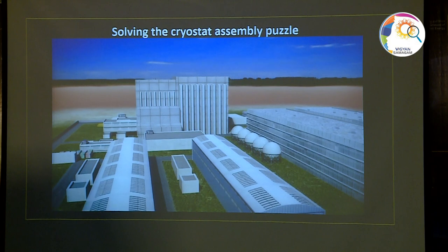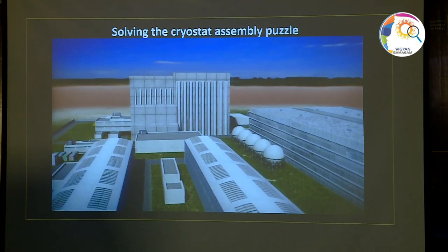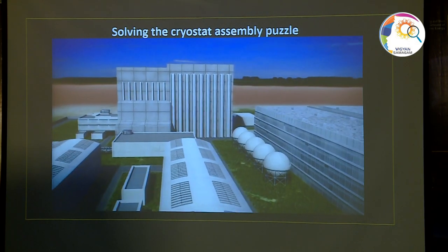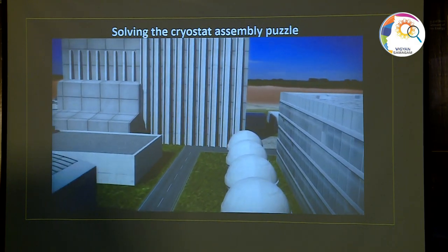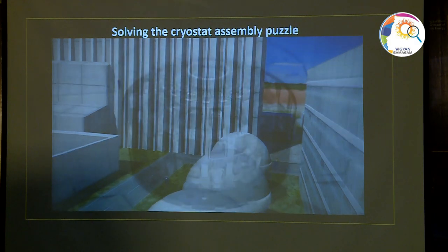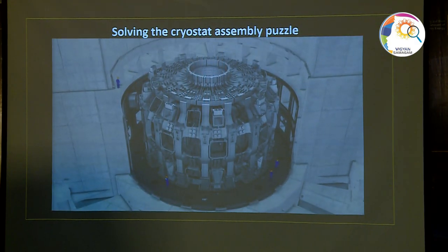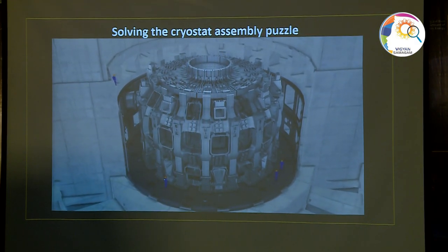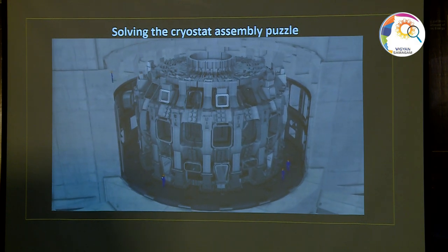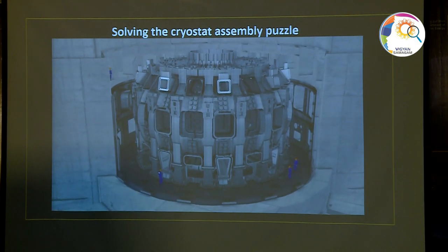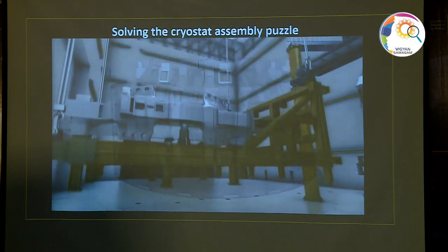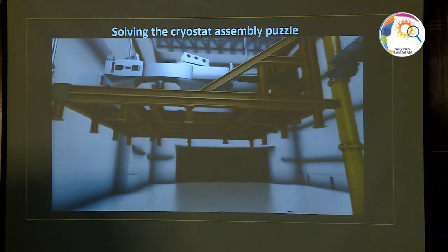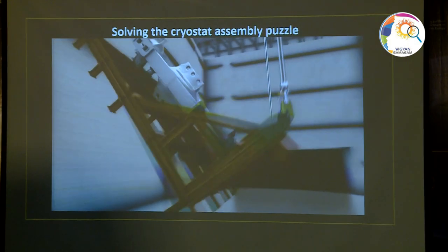The principal assembly activities will be performed in the tokamak building, where the ITER device will be installed inside a partially embedded concrete bioshield. For the duration of assembly activities, the tokamak building will be operated as a clean area and maintained at a constant temperature to avoid dimensional changes in the largest components. Pre-assembly activities will take place in the adjacent assembly hall.